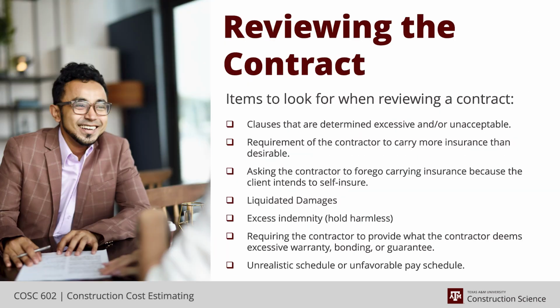So what are some of the concerns that I'm talking about? Requiring more insurance than you really think is necessary. In some cases, more insurance is better, but it's also more costly. And that extra cost may put you out of competition.